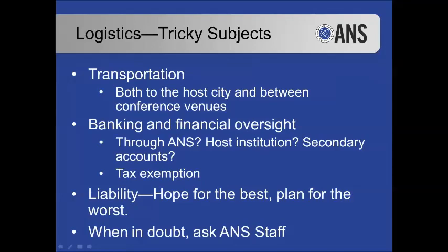Something that also falls in this category is tax exemption. This is just one of those things you need to talk to your university resources and ANS staff about. If I have the conference in California, is ANS tax exempt in California? If I have my own secondary account, what steps do I need to take to make that secondary account tax exempt? Do not ever assume you have tax exemption, because that will not be the case.